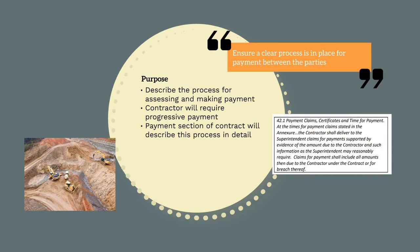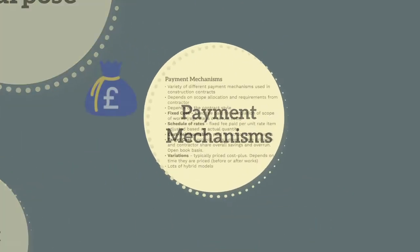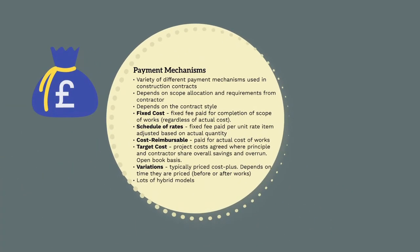The way contractors are paid will vary depending on the different payment mechanism in the contract. Payment mechanisms are effectively different ways the contractor can get paid. There are a wide variety used in construction contracts, and the type used will vary depending on the scope and risk allocation passed on to the contractor, and ultimately the form of contract chosen.